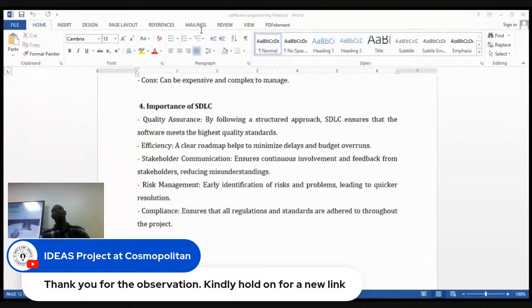You multiply it by 90, that's about 900,000. That is for you. So what of your team? How many people do you think will work on this project, and how much do you think each of them will charge within those 3 months? You put it in, and that will give you an idea of what to charge. Software is not cheap.